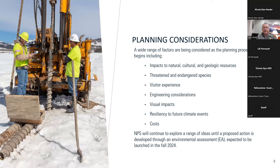Some of the things we consider as we've looked at these alternatives: what are the impacts to the resources of this park — natural, cultural, geologic? This is a heavy wildlife corridor from a migration perspective, whether you're talking elk, bison, bighorns, or others. We've got threatened and endangered species considerations. Visitor experience is important — the north entrance is the second busiest of the five entrances in the park, with up to 3,000 cars per day entering from Gardner at peak. It's a major entrance for people coming in from Montana.